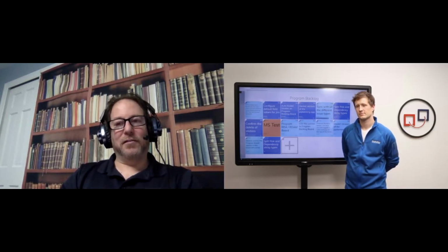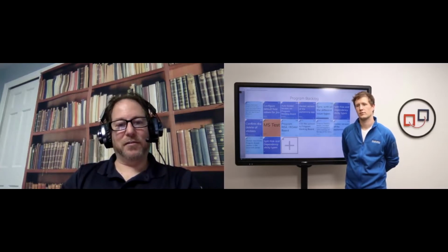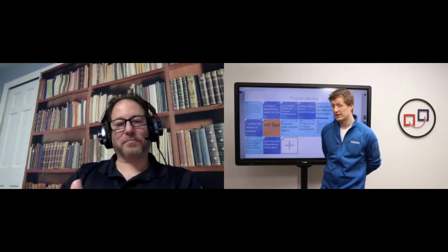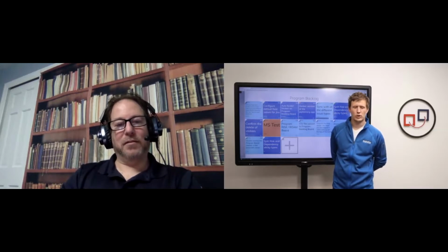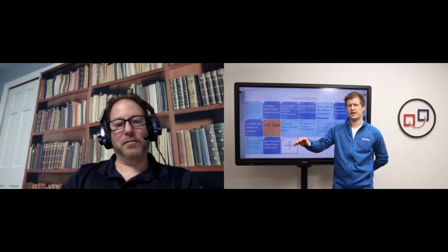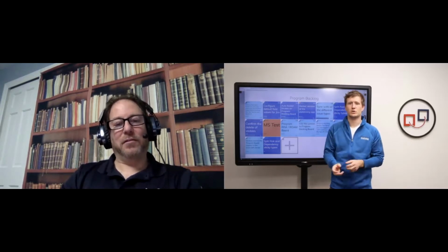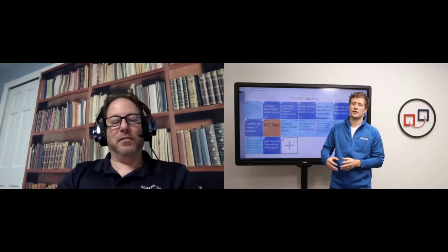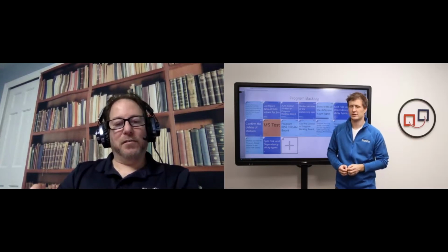And the last one, I think, what should we concentrate on when running a virtual PI planning simulation prior to the actual PI planning? That's a good one. I definitely suggest to do a dry run, especially if it's the first time. And what I would suggest, don't use productive data. You should focus on your working agreements, on your use cases, so that people get trained how to behave during, let's say, a feature breakdown, or how do we behave when presenting the PI objectives. That's what I would suggest in the first place, not using productive data.